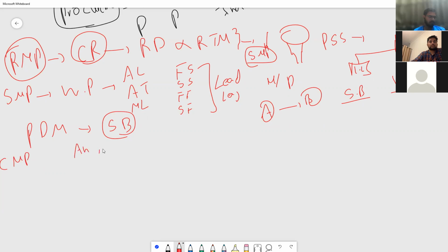Parametric estimation, like using historical data but with parameters. Three-point estimation: optimistic, pessimistic, most likely, with the triangular distribution, as well as with the PERT formula. Then you can also use bottom-up estimation, which is also called cost aggregation. Once we do that, we also consider the funding limit, when the funds will be released, and how the project funds are going to be released.